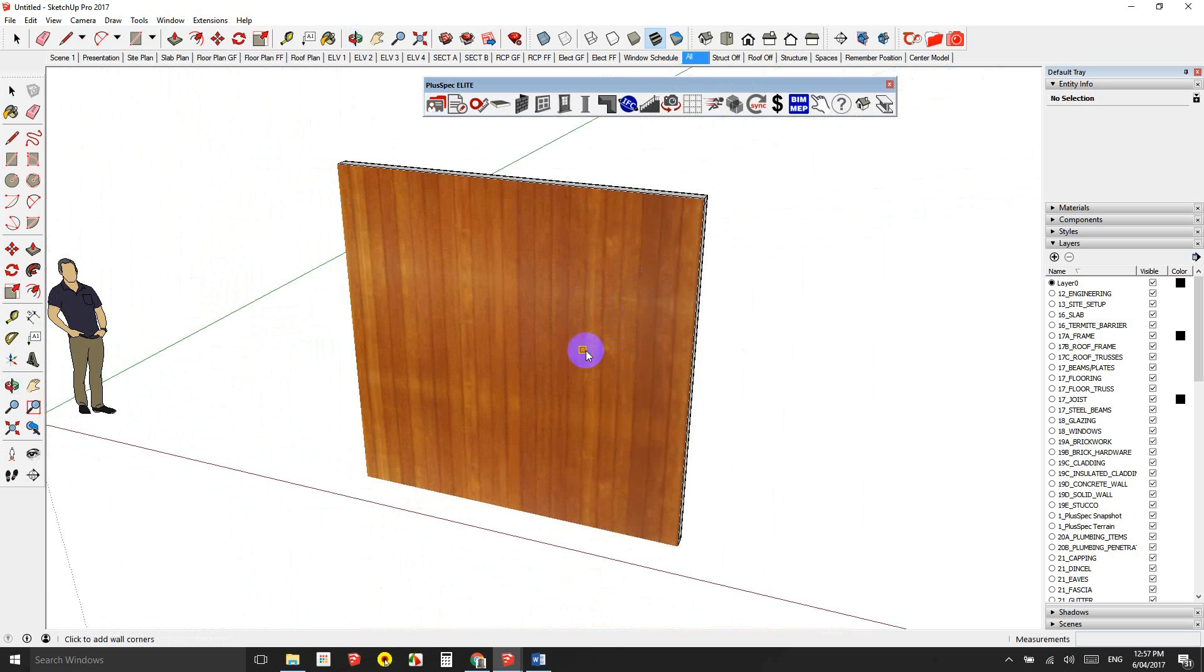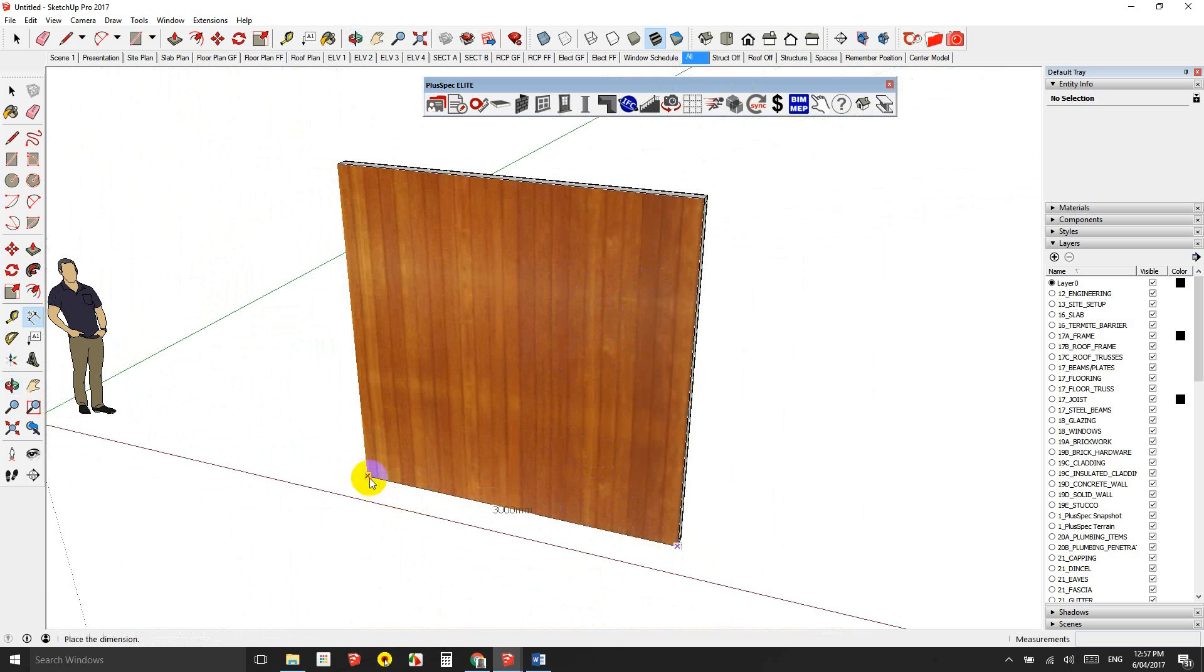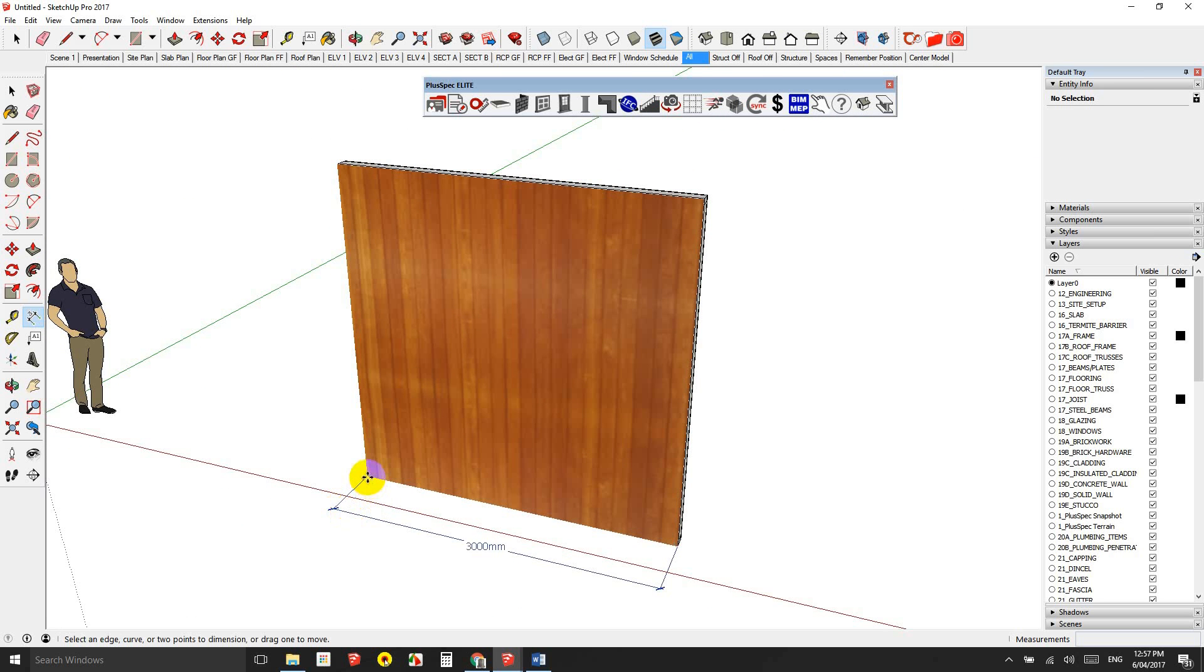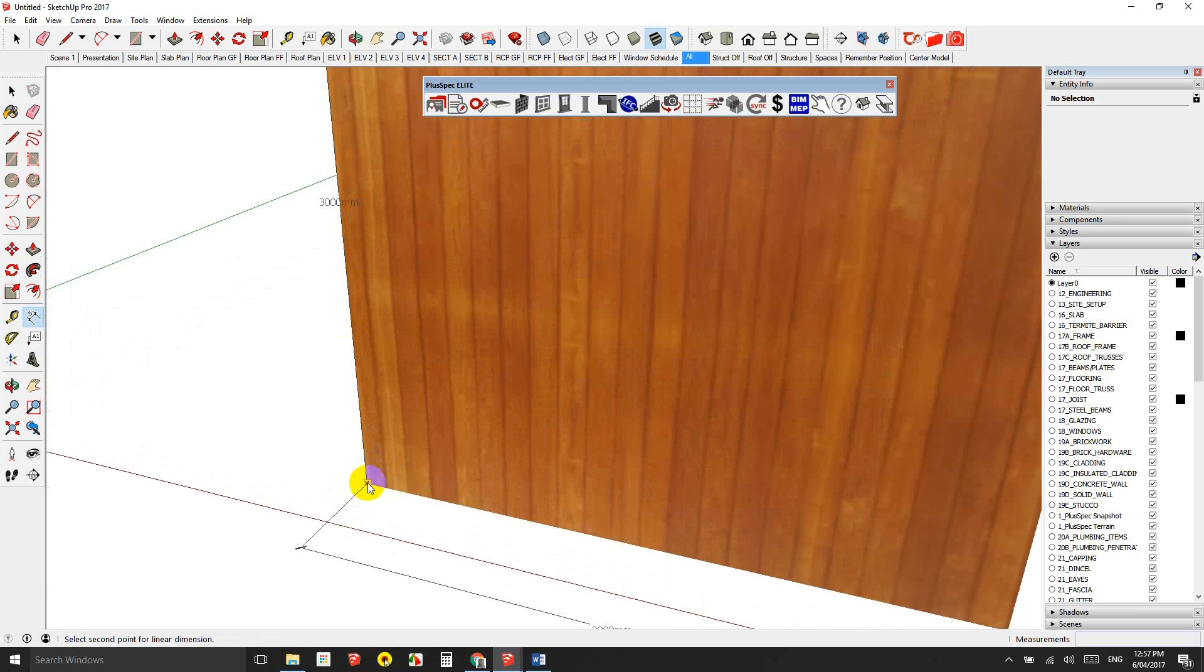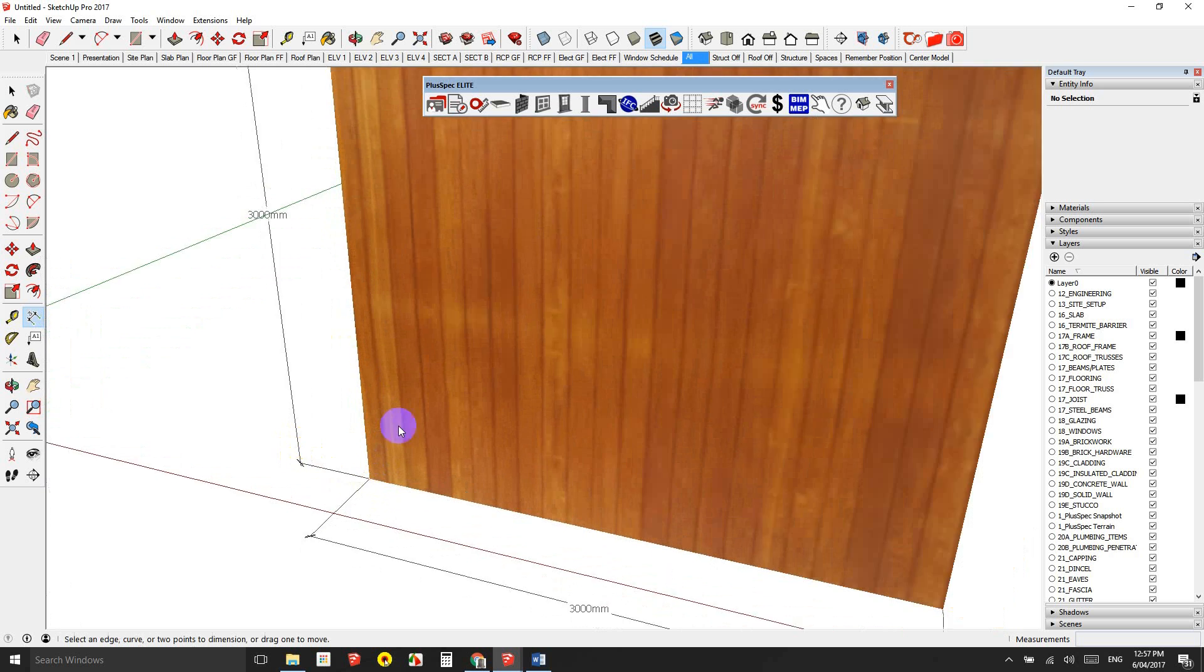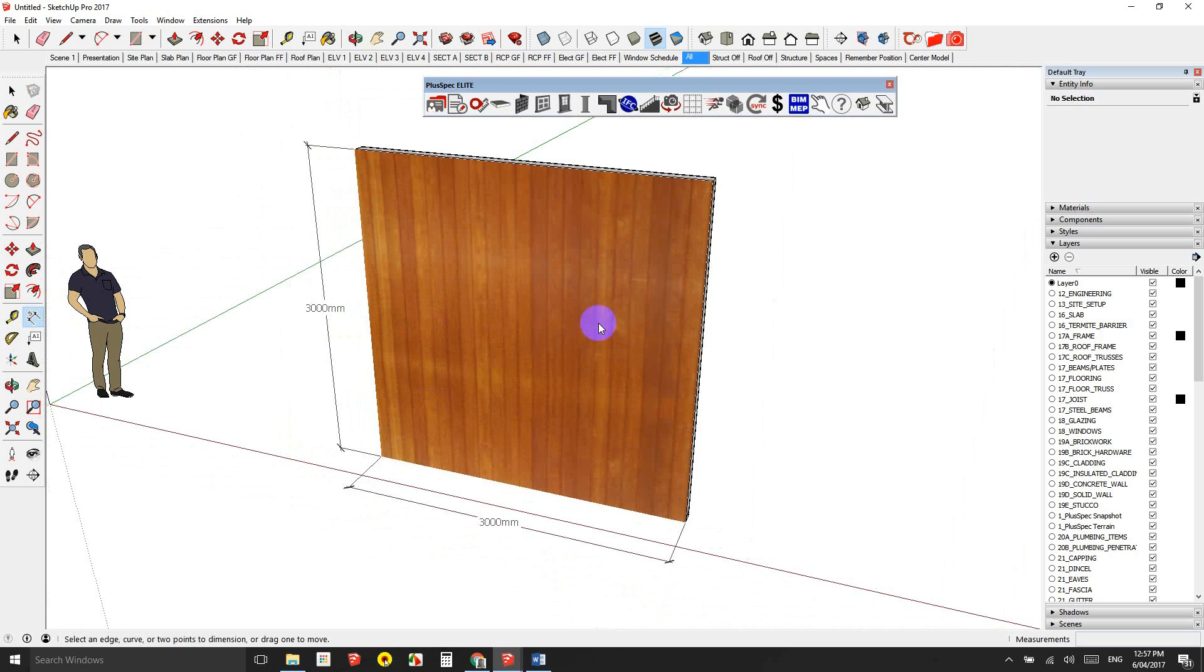Now traditional estimating software, what it does is it takes a measurement from the line of the wall when you're looking at it from top down. It says, okay, the wall's three meters. And it also takes an estimate from the height. So length times breadth. So obviously we're going to have nine square meters of cladding and we'll check that in a second.